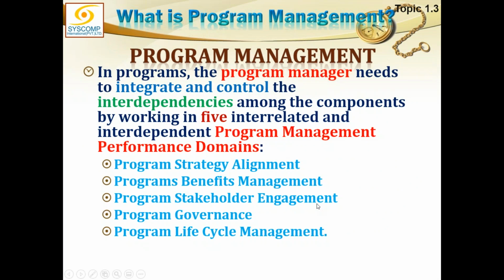In programs, the project managers need to integrate and control the interdependencies amongst the components by working in 5 interrelated and interdependent program management performance domains. So here it comes. What are the program management performance domains? And this is exactly what is going to be tested in your exam. These are the 5 domains: program strategy alignment, program benefit management, program stakeholder engagement, program governance, and program lifecycle management.